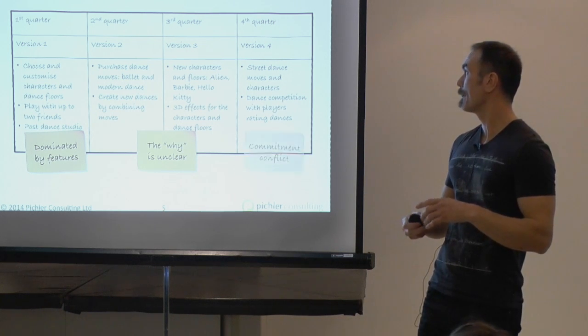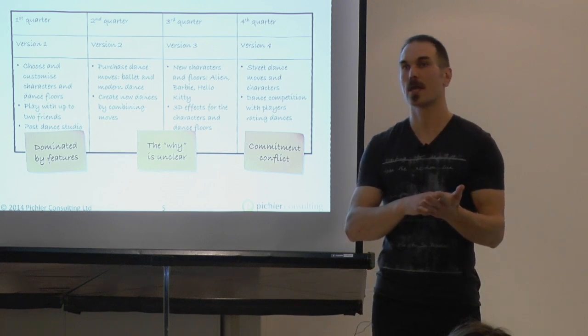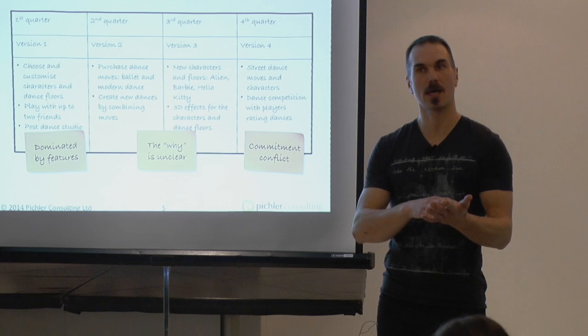And finally, I don't know if you've experienced that, but I've seen senior managers and salespeople look at traditional product roadmaps, look at the feature lists, and essentially take them as given, as granted, as sort of commitments. And that then creates a conflict with the Agile teams, who usually make the commitment only for the next few days or few weeks.